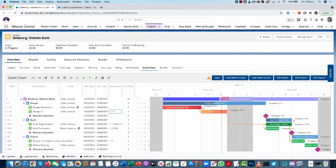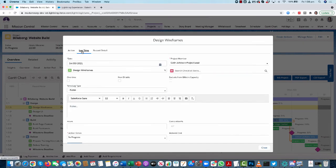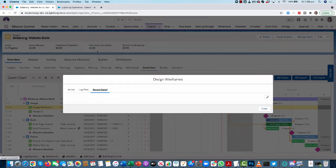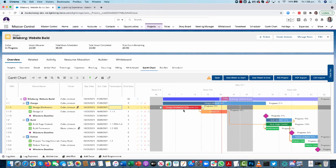You can double-click into a record to add more information. The action tab gives you key fields — you can reassign the owner, jump into the resource assignment wizard, pull in additional resources, and change the hours scheduled and status. You can also log time via the log time tab, or click record detail to access the full action page layout including any custom fields. This same ability is available at all levels — project, milestone, or checklist.